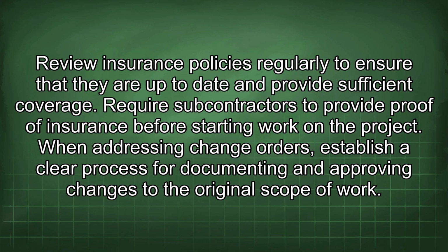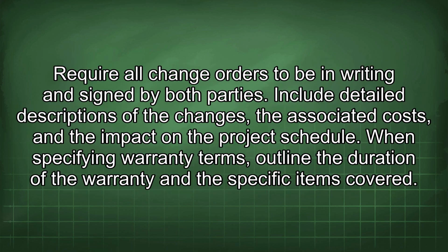When addressing change orders, establish a clear process for documenting and approving changes to the original scope of work. Require all change orders to be in writing and signed by both parties. Include detailed descriptions of the changes, the associated costs, and the impact on the project schedule.